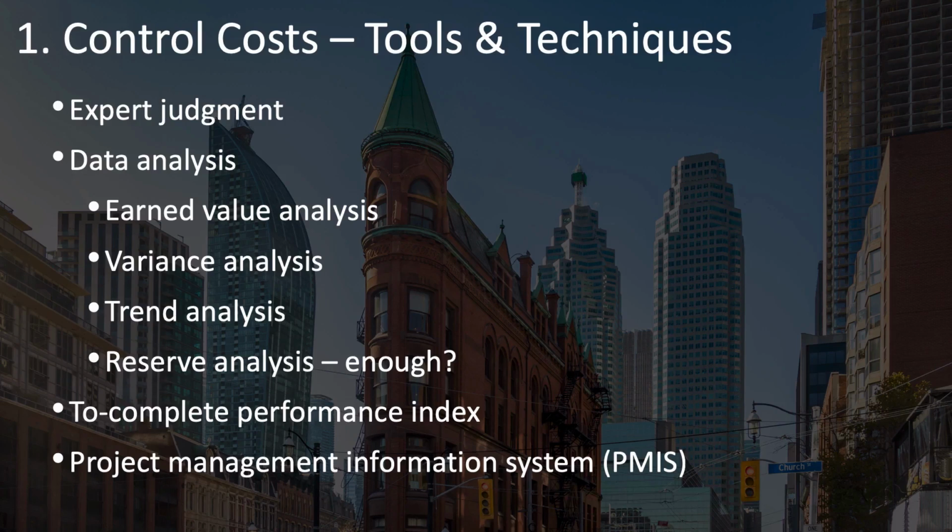This can be a little intimidating at first, but it can be a very valuable tool for measuring the progress and performance of your project. Next come several data analysis tools and techniques, including earned value analysis, variance analysis, trend analysis to see how your project is performing and whether performance is getting better or worse, and reserve analysis, which is simply taking a look at your contingency and management reserves frequently and seeing whether or not you still have enough or perhaps too much.